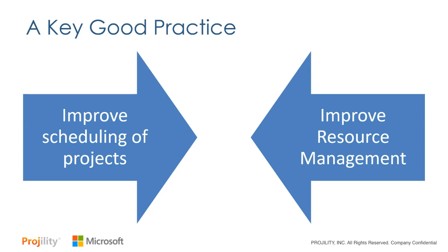And what you should really think about doing is breaking your work down to a level of detail that you can track against. Do I want to track it by epics or sprints? In order to have detailed metrics that map between the two systems, you really have to think about that level of detail and what you want to report off of. It may be a little more work up front and take a little more planning, but the results give you the ability to understand and plan resources based on what they're really doing, which is really the goal here.